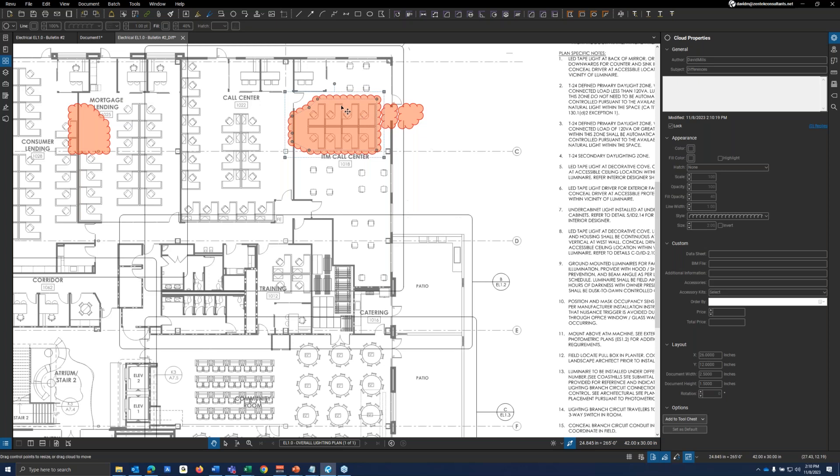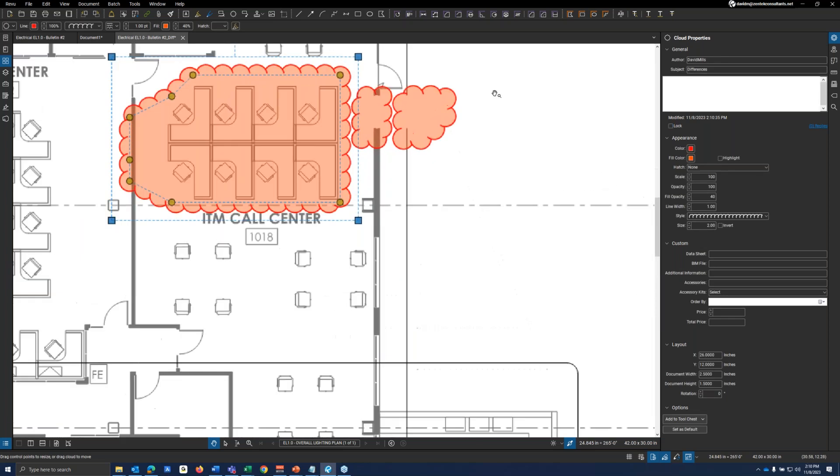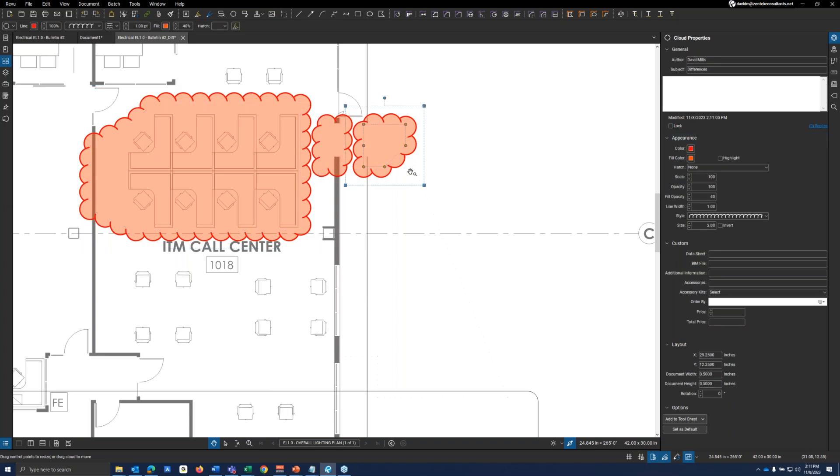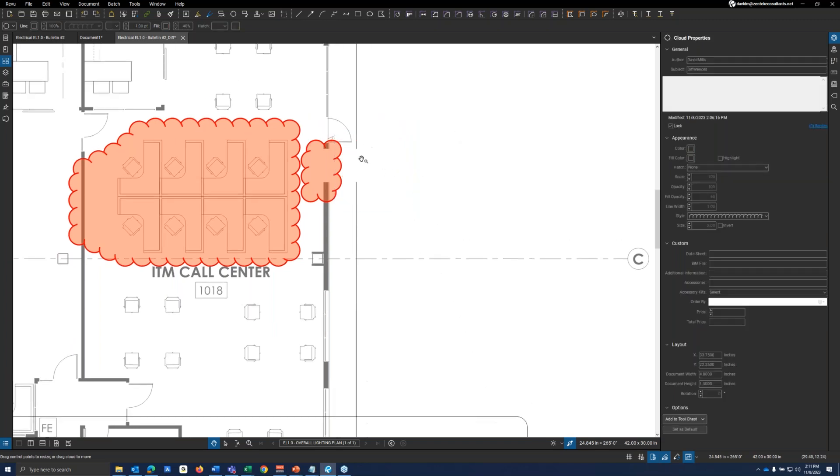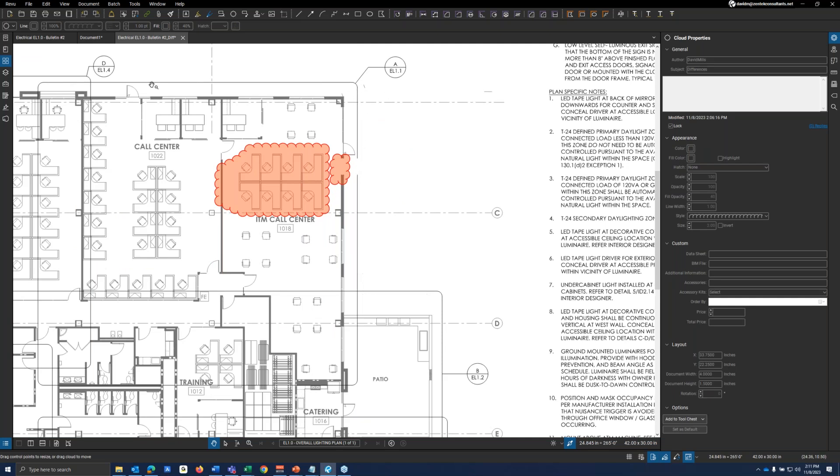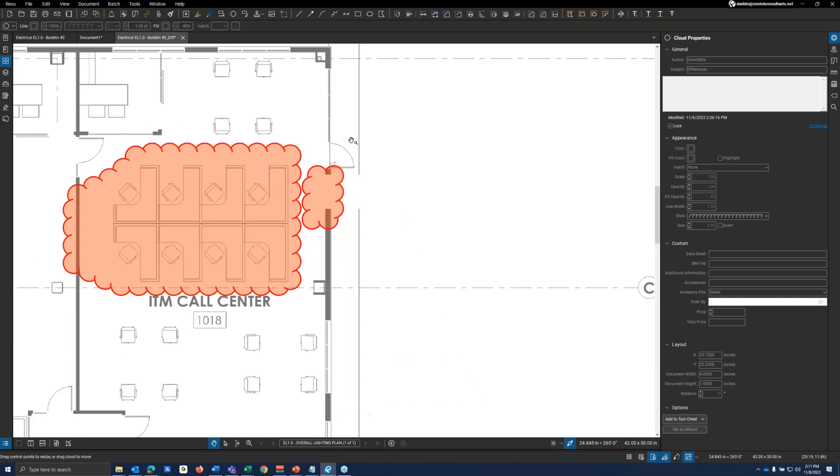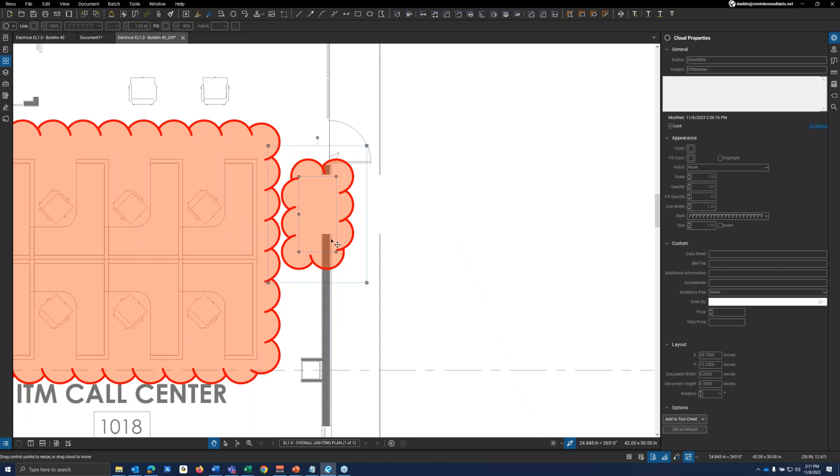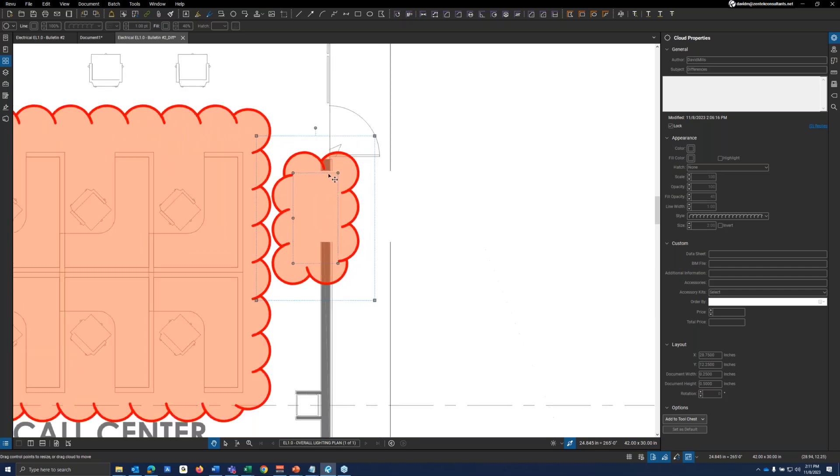One little bit of a downside, I don't want to say it's a downside, it's just something you need to be aware of, is it looks at every single pixel on this drawing. Every single pixel it looks at. So if you have a new drawing, and it may have added just one or two pixels, and you may not even be able to see them being fully zoomed out, you just see a red circle around it. That is one of those scenarios where you can click unlock, you know, maybe this line right here, this is just a mistake. It's not an actual change per se. I want to just delete that, right? Because this is just an enlargement line for a, you know, for this floor plan, or to look at an enlargement. However, this area that we have right here may be a little bit cause of a concern. On this particular comparison, because maybe there's both to be a door right here or a window that never got added into the final set, it was just, hey, they cut out this wall right here.